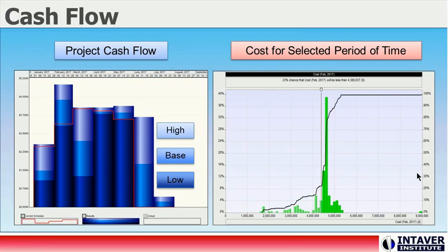The cash flow chart shows probabilistic cash flow over a set period periodicity — months, bimonthly, quarterly, or annually. In this particular view, we can see that in the period of February, there is a high probability that costs will be well above the current forecast due to risk. In addition, we can see that because of delays, the project should expect to experience two additional months of costs.